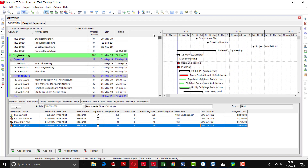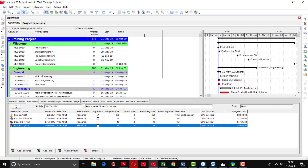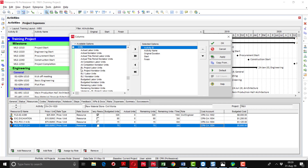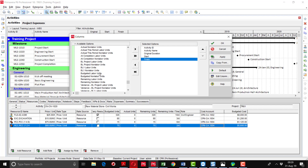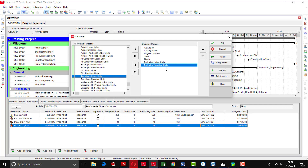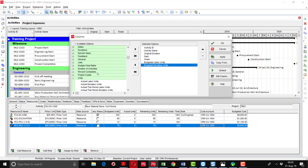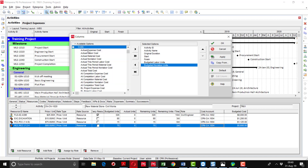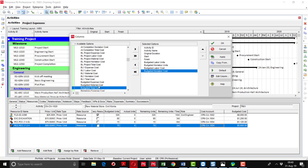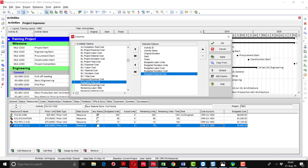Now I want to see all of these resources in the columns. I will right-click, go to the columns option, and go to the units folder. Here I am going to add budgeted labor units — budgeted labor units means man hours. Budget non-labor units means machinery. Then going to the cost field, I also want to see the cost associated with labor units, non-labor units, and material. I am going to select budgeted labor cost, budgeted non-labor cost, budgeted material cost, budgeted total cost, and budget expense cost.